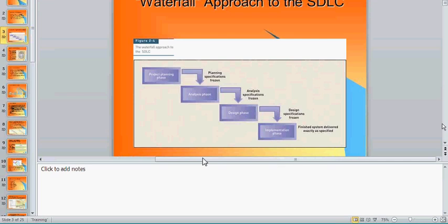You also know what are the problems, what are the project objectives, and how to solve for that problem. And based on that, you have options. You figured out which is the correct option, right? Best option to meet these objectives. So your planning is supposed to be correct. Once you've planned it, then you will analyze. So analyze really means you will gather the requirements, you will analyze them, you will document them, you will validate them. Okay? Once you have a proper sign-off,